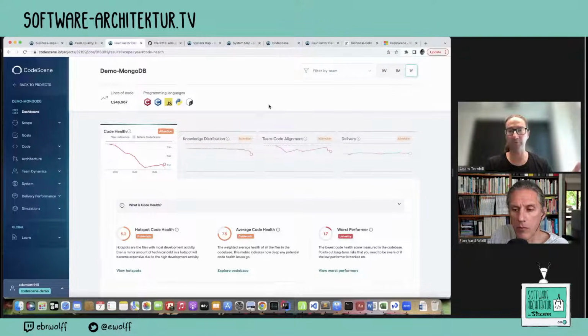So we can either go ahead with those features because they are so important, but now we know about the risk, right? This could take 10 times longer. It can have all these defects, so we can anticipate that up front. So it will be a calculated risk. But in the best of all worlds, we'll go back to the drawing board and say, okay, let's instead spend some time refactoring, improving this code so that we can implement all these features safely, right? So we can have these conversations.